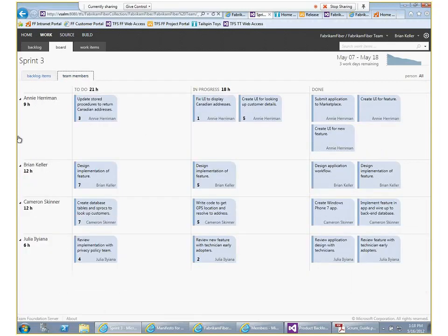So the next event that we're talking about is the daily Scrum. Again, this would be the view that you would do your daily Scrum with, right? In this case, you would focus on what you're planning for today, what you've done yesterday, and if you have any impediments.